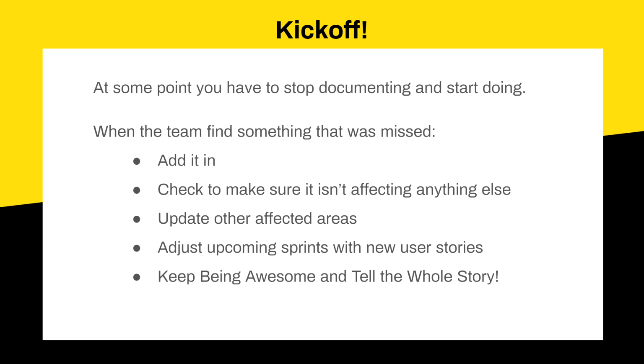They know their sprints. One of my friends right now is working for a software company, and they're planning their sprints out. However, they're not meeting their sprint deliverables, which means their sprint planning is off right there. And so they have stuff carrying over from sprint to sprint, and they're just getting further and further behind. And nobody knows what their actual priorities are. This kind of helps shape all of that.